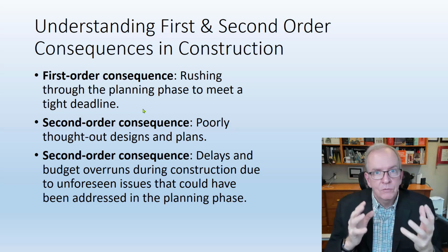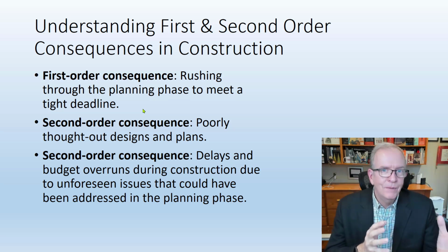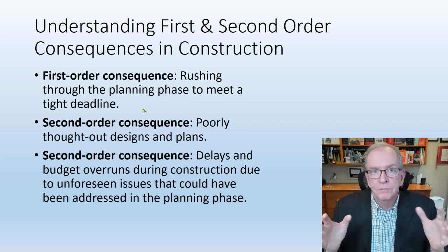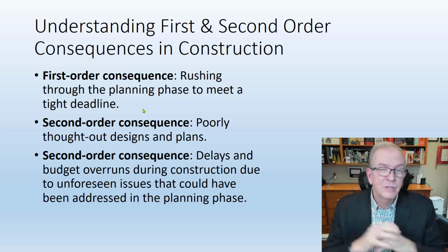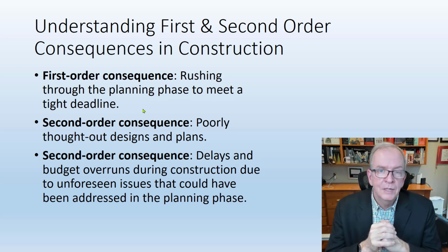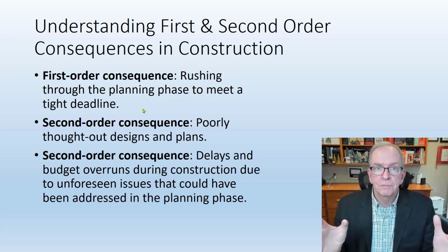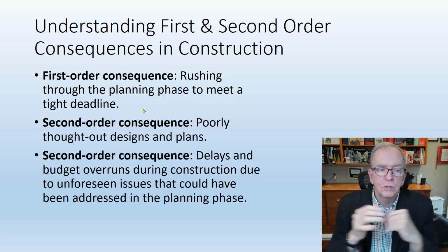And so that will tend to really cost you a lot of money, because the biggest opportunity to save money is in the planning stage, right? Actually, the biggest opportunity to save money is in the design phase, the early design phase. That's where our contract models have some issues, because owners typically want design-bid-build because they think they're going to have a lump sum price, but then they end up having a whole bunch of change orders, which has a lot of ripple effects onto the project.